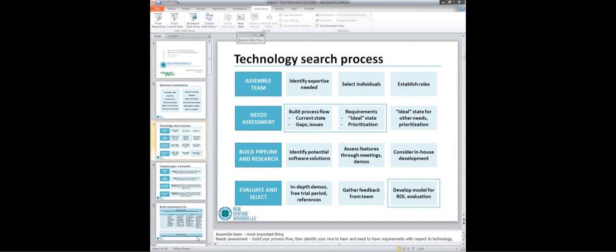I think it's really starting with doing some Google research and asking around to get a list of maybe 5 to 10 vendors, and then culling it down to 3 to 6 very quickly that you want to start doing research on, with the goal at the end of the step of having 1 or 2 vendors that you're really excited about going through far more in-depth research and discussion with.